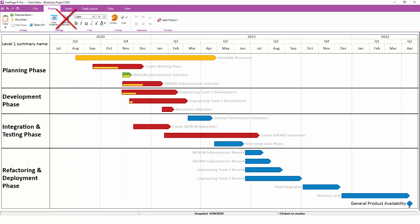So by definition, when you hand-format a task, you will not be able to capture that formatting in a template for future use. That said, manual changes that you make will always be saved back to the chart in which you made them. So if you're just updating the same chart each week as your project schedule changes, you can rest assured that any manual formatting you did previously will carry forward as you make those updates, as long as you're using the same chart as before.